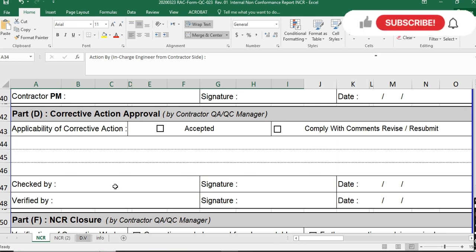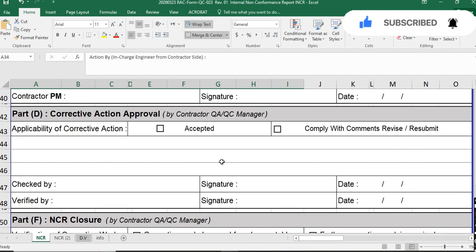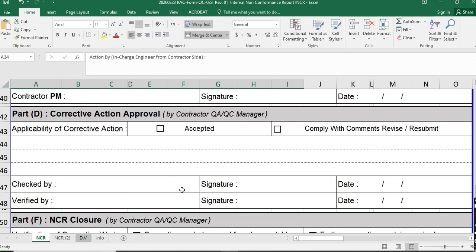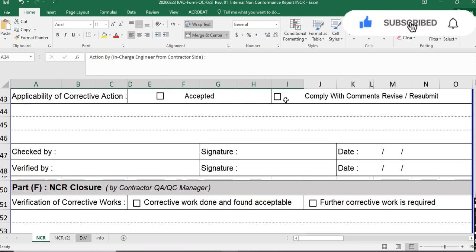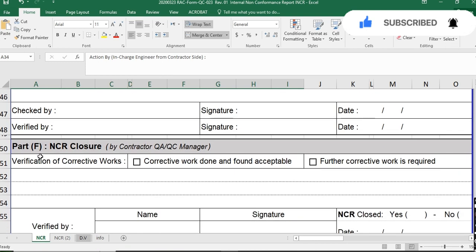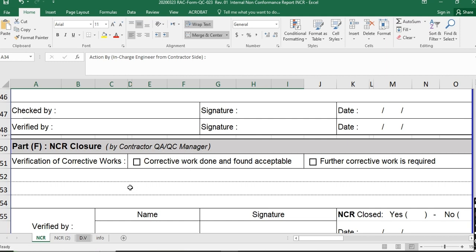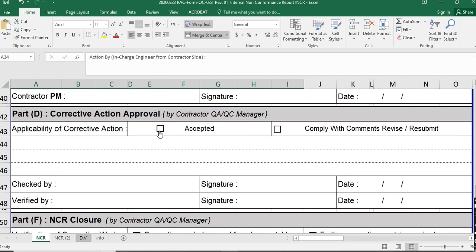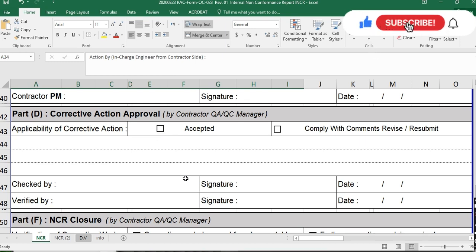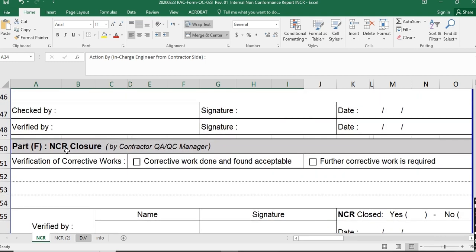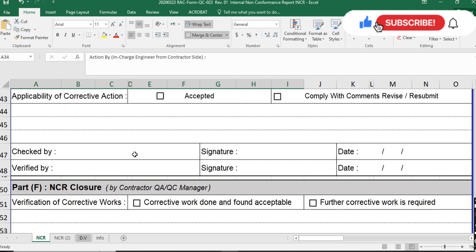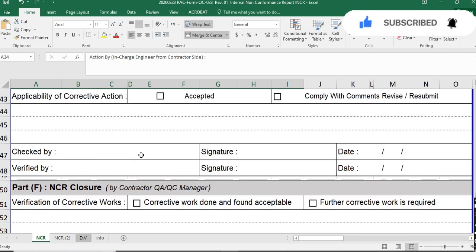If the corrective action is accepted, it is checked and verified by the QAQC manager or project manager. After acceptance, Part F covers NCR closure by the QAQC manager. If the corrective action is accepted, this INCR is resent to the construction team confirming acceptance so they can move ahead to complete the corrective work. Part F is verification of corrective work.